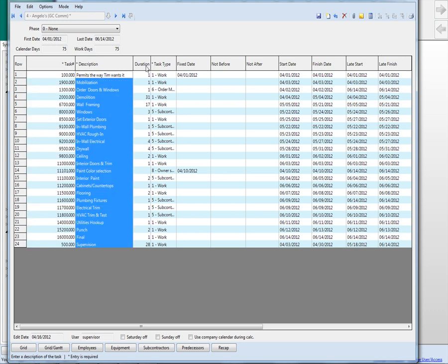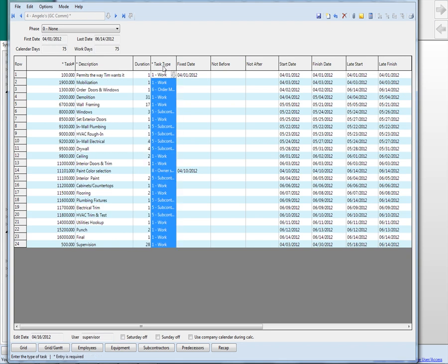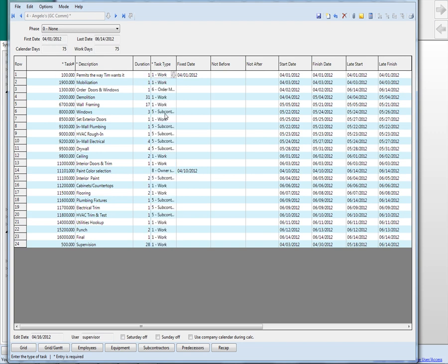And then the duration and days that it's going to take. And then what kind of task is it? Are we doing the item? This is a work item for us to do. Is it an item that's subcontracted? Oh, here, number eight, owner selection. So their paint color selection. That kind of shows up as a task for the owner. And then the fixed date that they absolutely have to have that.